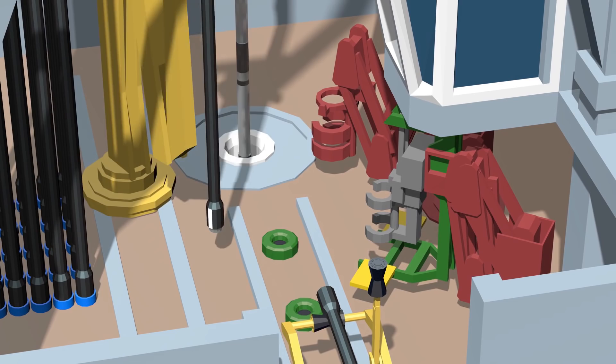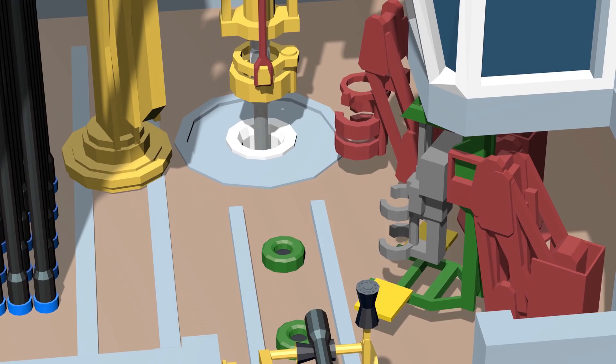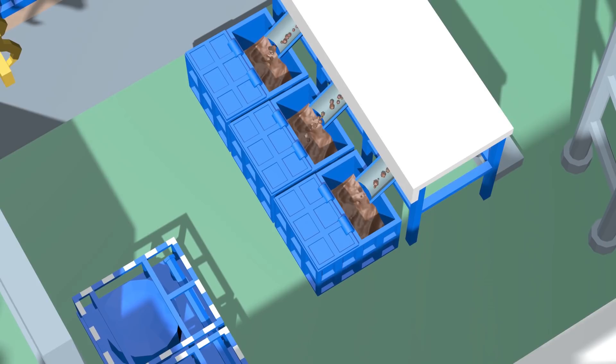And there were other efficiencies. The skip and ship system for collecting rock cuttings was modified to allow continuous work even during bad weather, when the cranes were out of action. And the MPD rig up was simplified to speed up installation times.